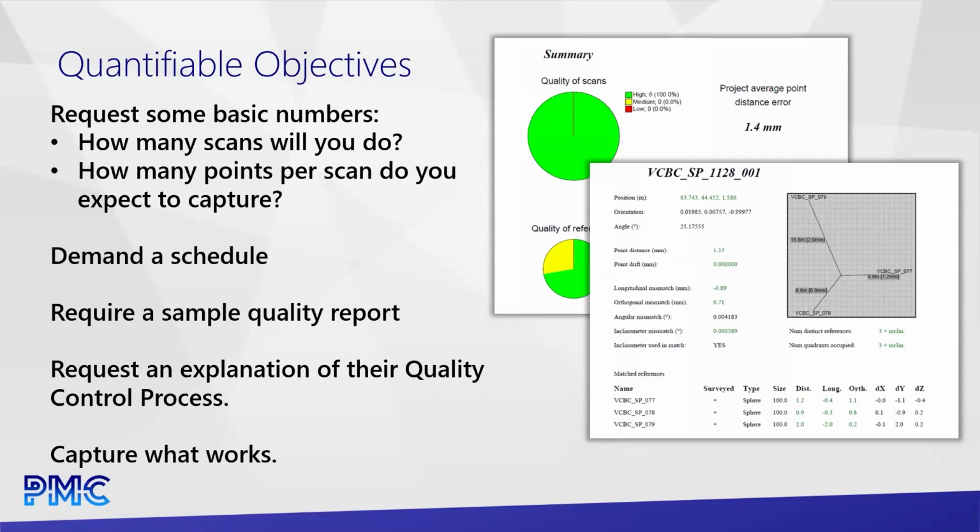And that whole process has to be done over again. And then you're going to get new data, right? On a 100,000 square foot building, let's say, you might be delayed a week because of an error they should have caught right at the registration process, and they didn't, right? And then they spent days creating these exports. And once those exports are made, they cannot be fixed. They have to be recreated.